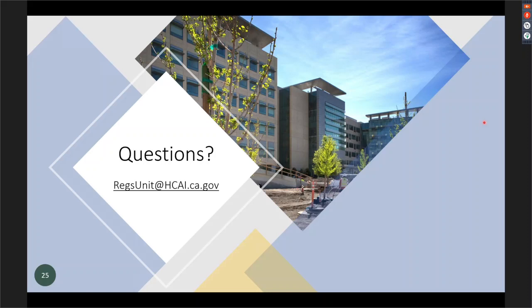If an RFI is materially altered or non-materially altered, it needs to be converted to an ACD or an NMA. We do not review RFIs. Now, if you have an RFI that is neither material or non-material, we don't review those. We don't look at them. We should never see them. They should never be presented to us.